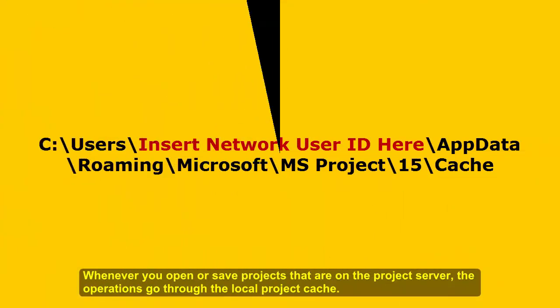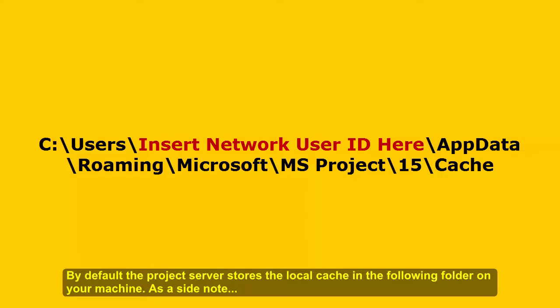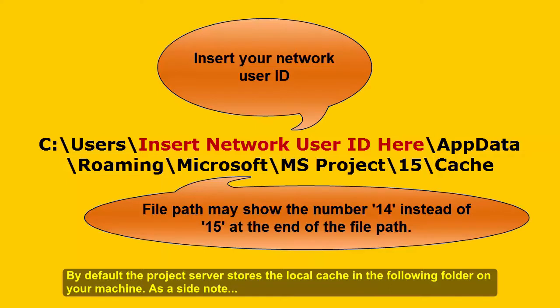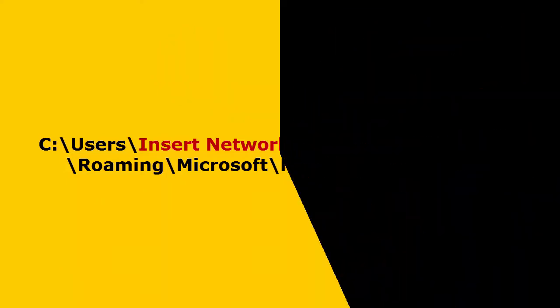Whenever you open or save projects that are on the project server, the operations go through the local project cache. By default, the project server stores the local cache in the following folder on your machine. As a side note, file paths of where the project is stored may vary slightly depending on the file setup when Microsoft Project was installed.